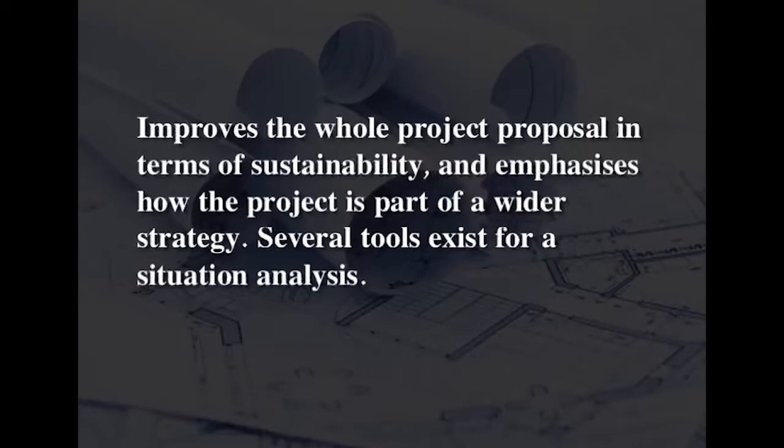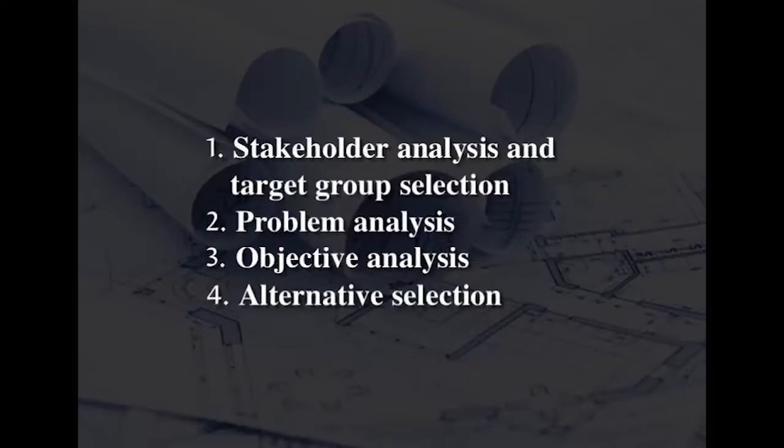It improves the whole project proposal in terms of sustainability and emphasizes how the project is a part of the wider strategy. Several tools exist for a situation analysis. To prepare a results-based project, 4 things have to be done. They are stakeholder analysis and target group selection, problem analysis, objective analysis and alternative selection.